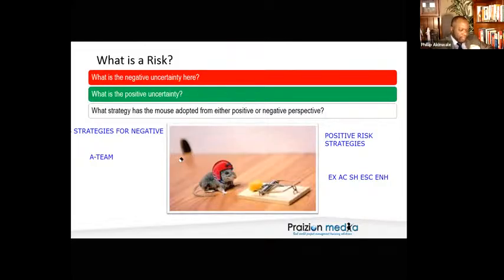Exploit, an example of exploiting the overall project level would include addition of high benefit elements of scope to the project to add value or benefits to stakeholders. Alternatively, the risk thresholds for the project may be modified within the agreement of key stakeholders in order to embrace the opportunity. So I would like you, without reading the PMBOK guide to you, please go through the other examples of transfer or share, examples of mitigate or enhance, and examples of accept. This is going to enrich your exam experience.